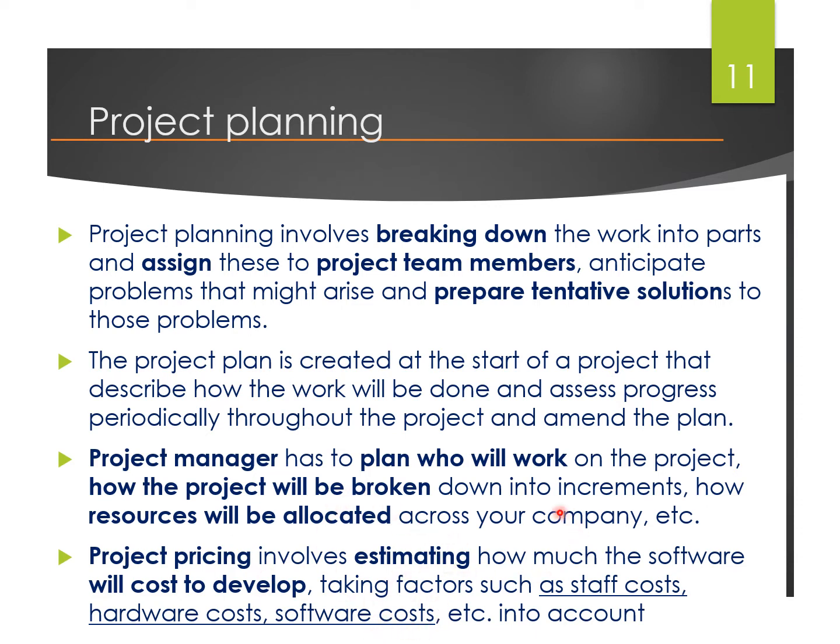This takes into account the staff cost, because you have broken it down and identified who will be in charge, so you know how many people will be there, how many programmers will be used, how many months they will be required, and then you can set the cost for the staffing.